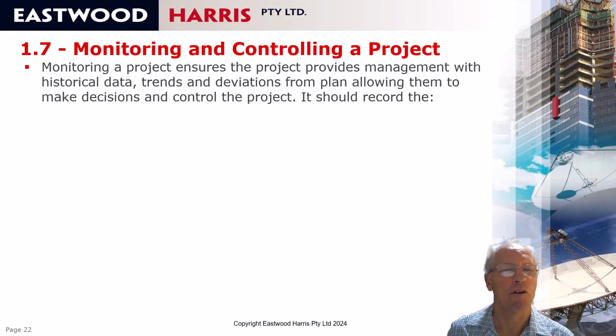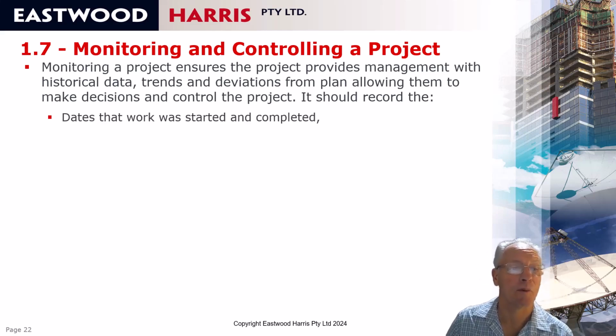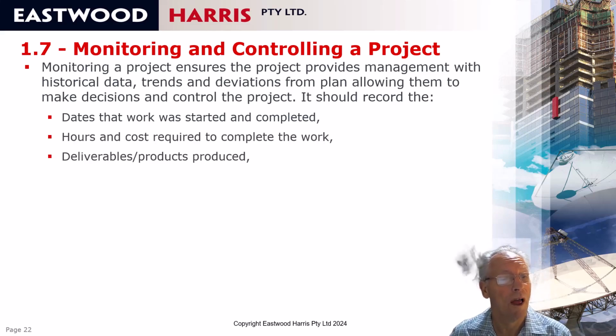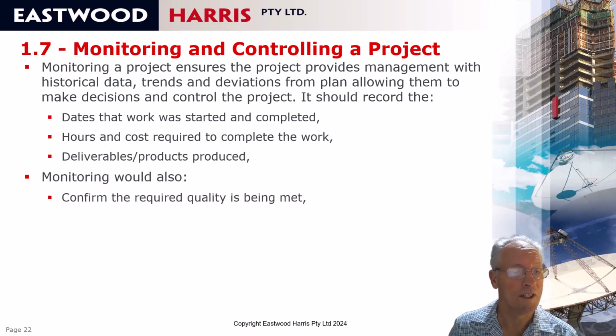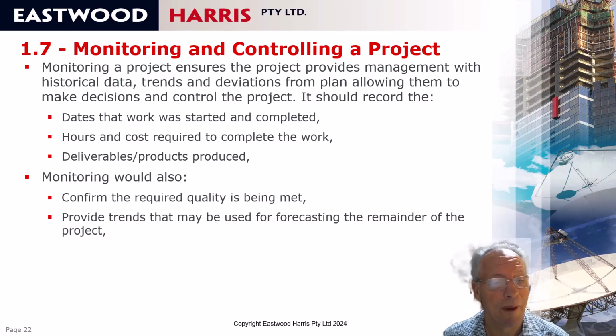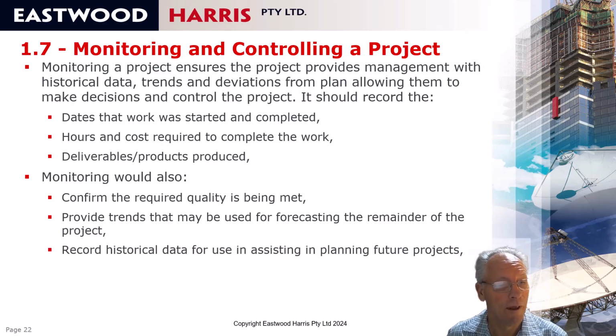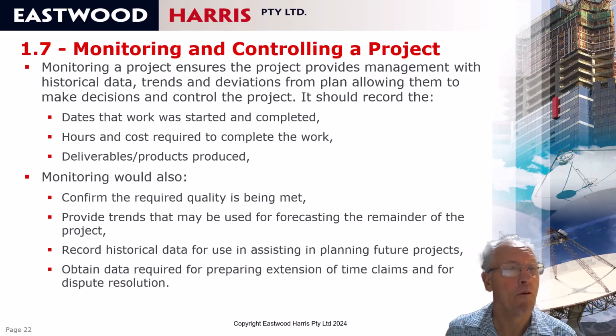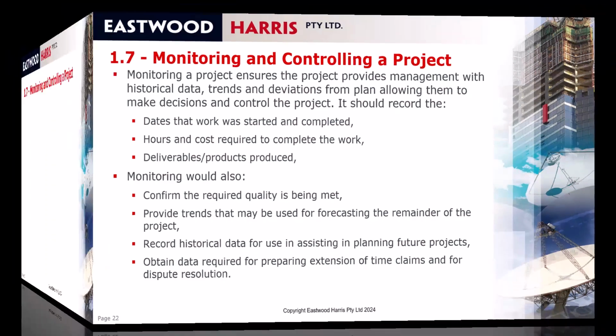When you're monitoring a program, you should record the dates and possibly times that work was started and completed, the hours and costs required to complete the work, and the deliverables or products produced. Monitoring would also confirm the required qualities are being met and provide trends that may be used for forecasting the remainder of the project, record historical data for use in assisting in planning future projects, and obtain data required for preparing extension of time claims and dispute resolution. So this is the scheduler updating the program before he or she discusses it with the project manager.